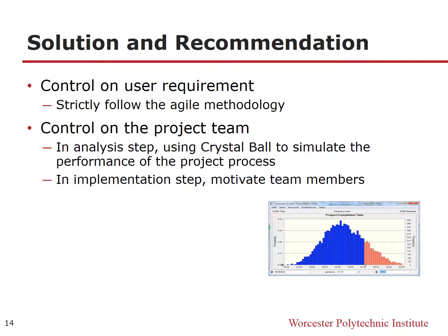Those come from the developers. Actually, in normal project management, managers could do investigations and surveys to get the optimistic and pessimistic estimations from the developers, and they can make proper preparations for the worst situation.